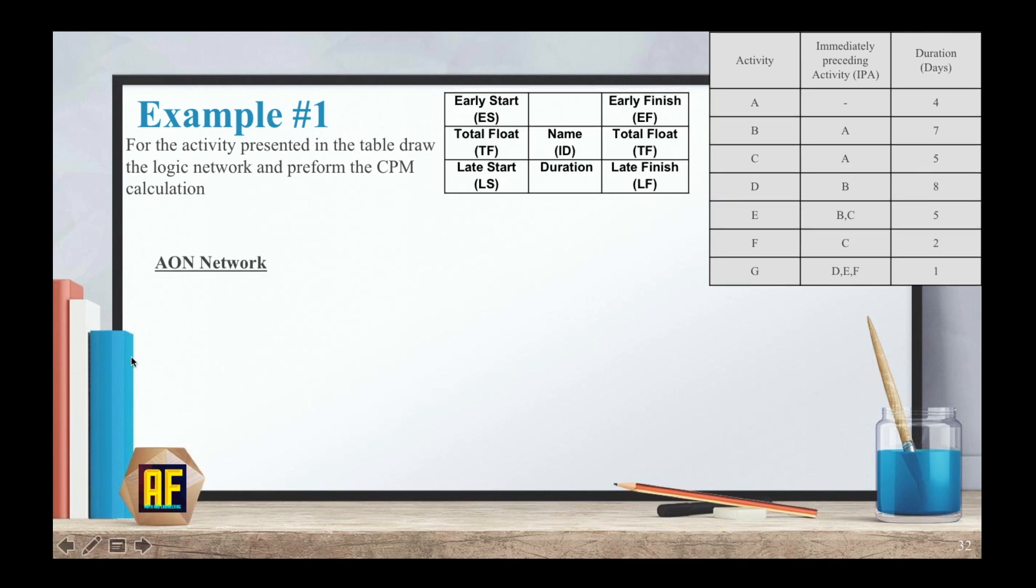So what is an AON network? An AON network is simply taking activity A and saying activity A goes to B and C. As we can see, activity A doesn't go anywhere, it's the first activity, and then activity A goes to B and C. We can continue with this network, but it's a waste of time. So let's go right ahead to the logic network, which is the main issue in this video.